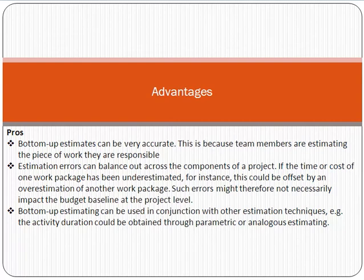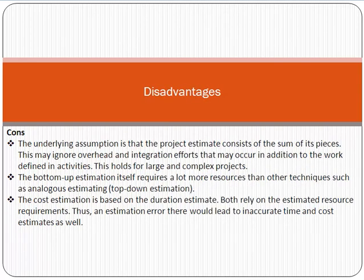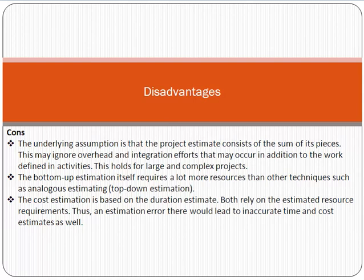The disadvantages of bottom-up estimation are: first, it is a very big activity by itself because it requires lots of time and resources. While it is very accurate, it is time-consuming. Additionally, the underlying assumption is that the project estimate is the sum of its pieces, which may ignore overhead and integration efforts beyond the defined work activities. Furthermore, cost estimation is based on duration estimates, and both rely on estimated resource requirements — so an estimation error would lead to inaccurate time and cost estimates.